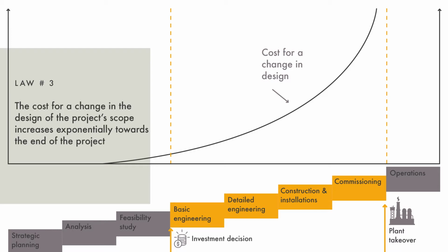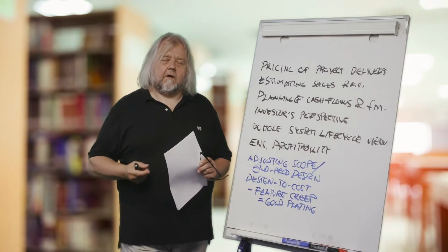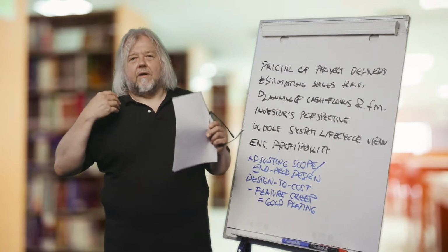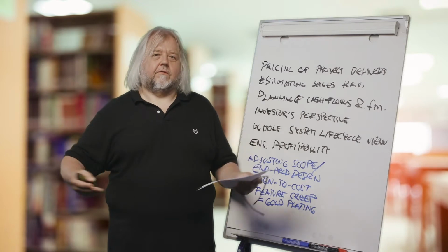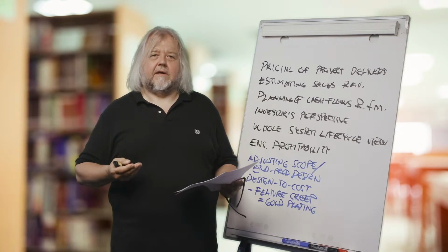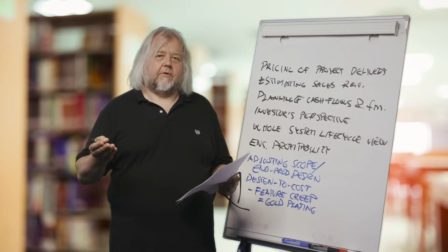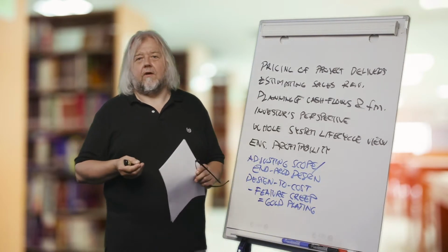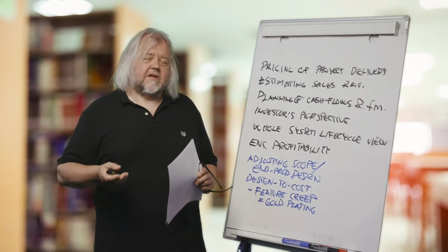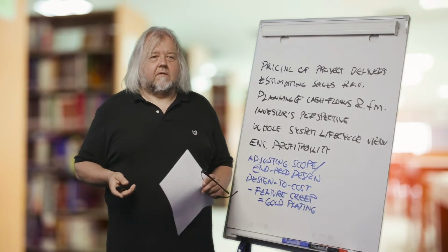There has been reliance on this item, and activities that build on this item that is now changed. The later we do the change, the more it affects other things, and a lot of rework must be done, and the project must come back maybe to earlier phases and start again doing something which is really costly.